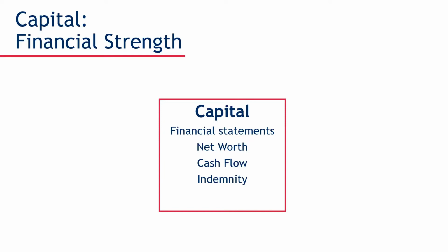Surety Company, if you ever have to step in on my behalf and you have to complete a project that I can't complete, you have to pay a debt that I can't pay for whatever reason, that I will reimburse you. Big difference between surety and insurance. There is no reimbursement requirement for insurance. You have insurance on a building that burns down, the insurance company pays a loss. They probably will cancel you, newsflash, and then you're going to have to try to find insurance from someone else. But there is no reimbursement effect there typically with most insurance policies.